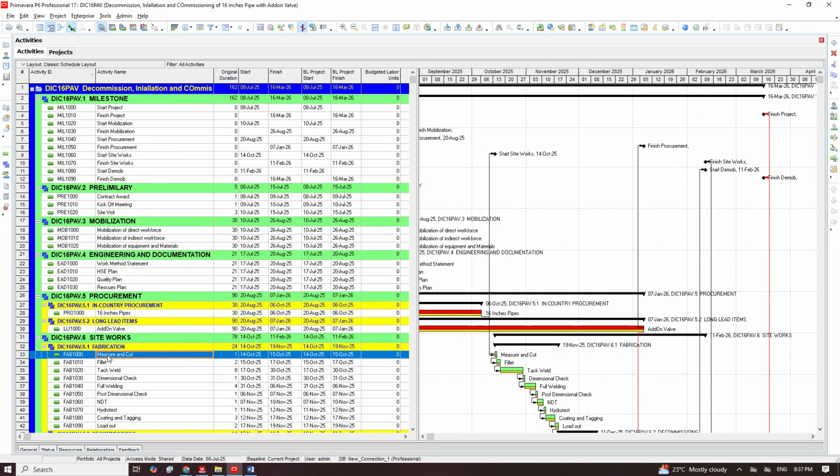So your duty is aligning with them, right? Rationally, you will be able to shrink some durations by understanding their challenges and what support you can provide for them to resolve, to get that job done in a shorter time. But don't impose it on them. The reason why you shouldn't impose duration on them is that if you impose duration on them, they will use less than that duration. They will make sure you overrun. And they will also come to tell you that they told you this is not possible, right? So that's why you work with them and make sure they are committed.